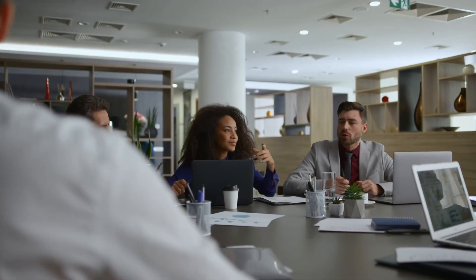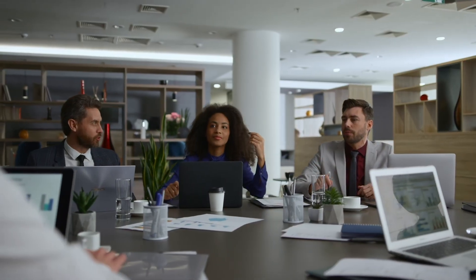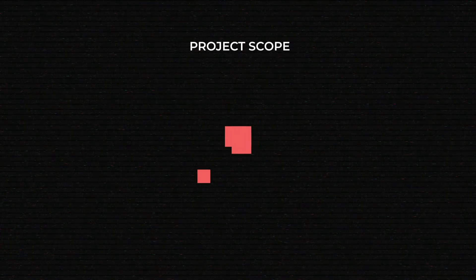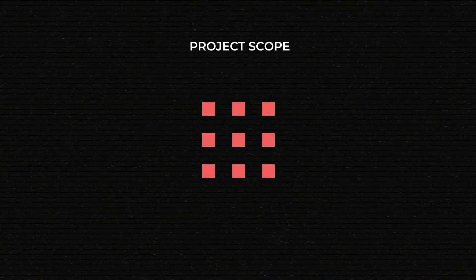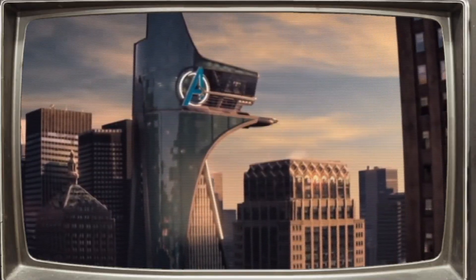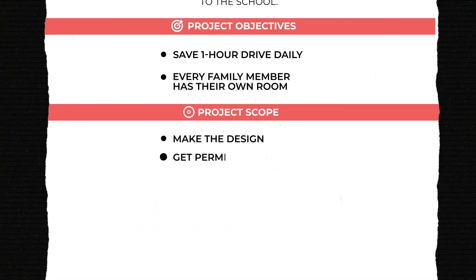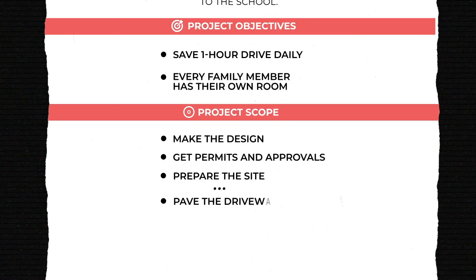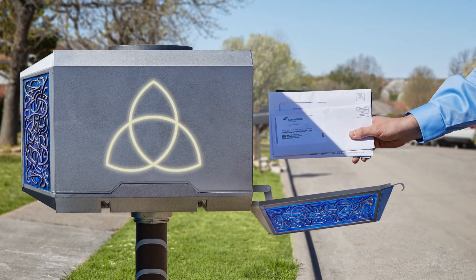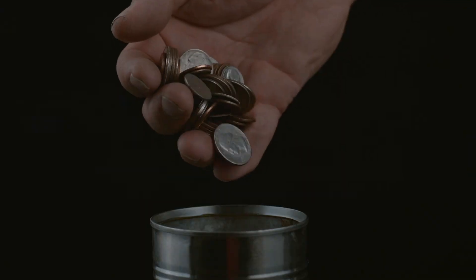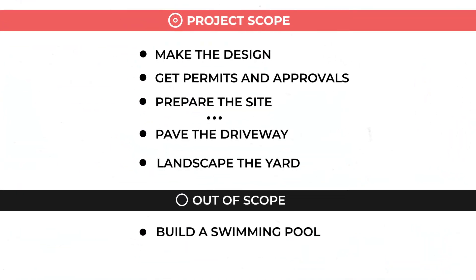Now that you've explained the whys, it's time to talk about the whats. Project Scope is the section where you list the pieces of work that must be done during the project, and the ones that must not. Break the entire undertaking into smaller blocks and define the main deliverables in each of them. As we plan our house, the Project Scope can include tasks starting from 'make the design,' 'get permits and approvals,' and 'prepare the site,' all the way up to 'pave the driveway and landscape the yard.' You might also want a pool, but if it doesn't fit in your budget right now, you can add it to the out-of-scope part.